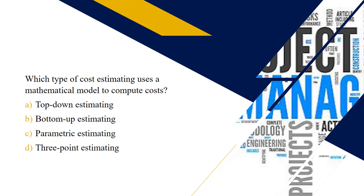Next question: which type of cost estimating uses a mathematical model to compute the costs? The answer is choice C — parametric estimating. Parametric estimating often uses a quantity of work multiplied by the rate formula for computing costs.